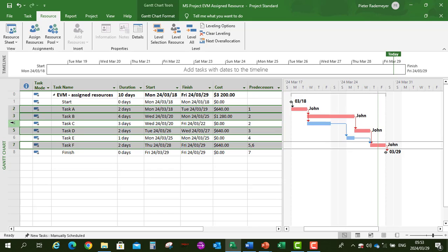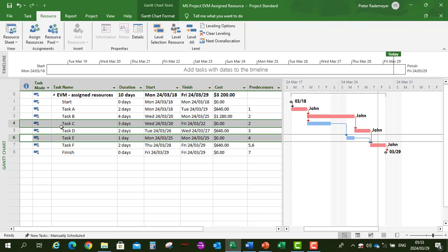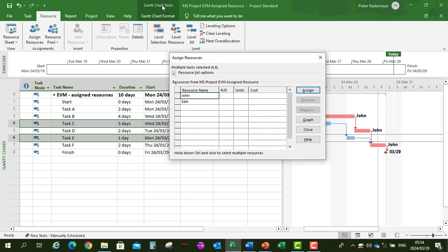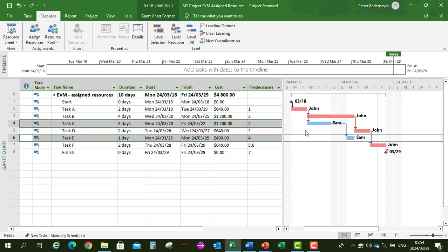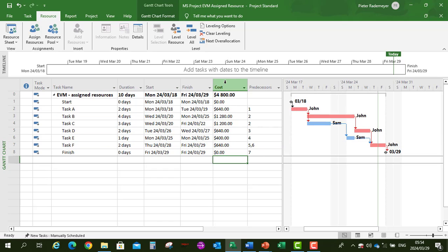For tasks C and E, we're going to assign Sam. Click on task C, hold Control on your keyboard, then task E, and assign Sam. Sam is now assigned to tasks C and E. By doing that, our cost has been calculated as shown earlier, giving us our cost per task as well as a total cost of $4,800.